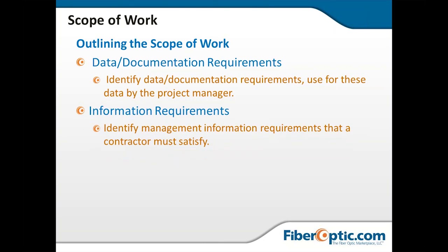Also, identify any kind of information requirements. What information you're going to need as a contractor to be able to do the job that was estimated by yourself or the customer. These are the things that I will need to know to be able to hit this price at this point. Because a lot of times what happens is you'll give a bid, and then you're not able to get the information you need in a timely manner, and then you're burning hours because your guys are in the field, and you're on the hook for that because you've got a fixed bid project.